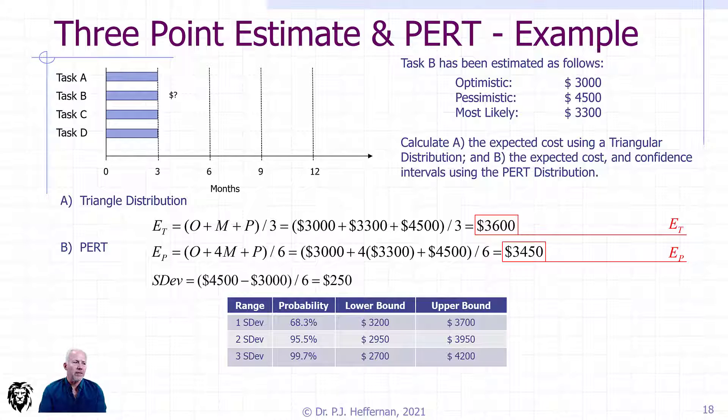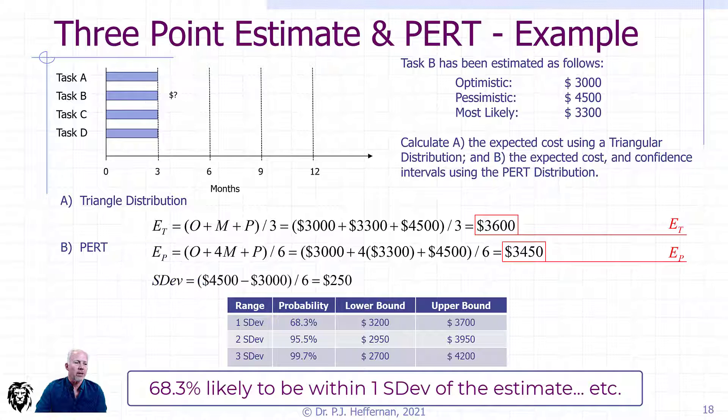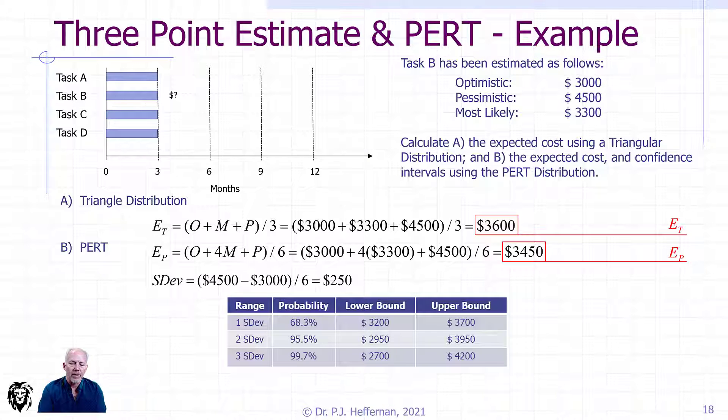That would break out to give us probabilities of achieving those various bounds. We would expect that if we're within one standard deviation of our estimate, the probability is we'll be above $3,200 and below $3,700. Or if we needed a higher confidence, we would have to extend those bounds out a little bit to get to 95.5% or 99.7% confidence that our estimate would be within those bounds.